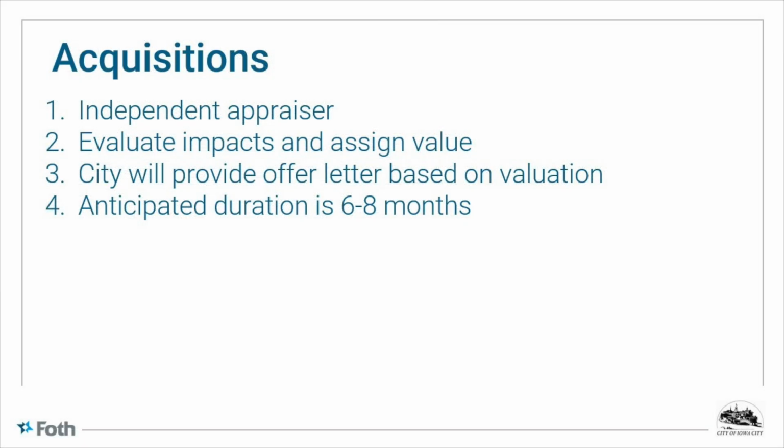So as far as the acquisitions go, for anybody impacted by the project, there'll be an independent appraiser that will go out. They'll appraise the property and evaluate impacts, based on if there's impacts to trees or landscaping items, that type of thing. A value will be assigned for that, and then ultimately that'll be presented to each property owner that's impacted by the city attorney, who will stop out, talk through that process, and provide that valuation.